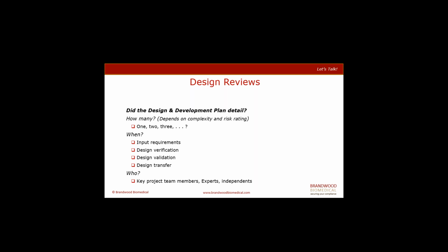But at the end of the day, design reviews can be held at any time. It really is up to the development plan within the project to identify what you believe are the most appropriate times to have these. They don't necessarily have to be at milestones or necessarily at phase gates, which some companies will use, but they're generally good identifiers for when design reviews should occur.